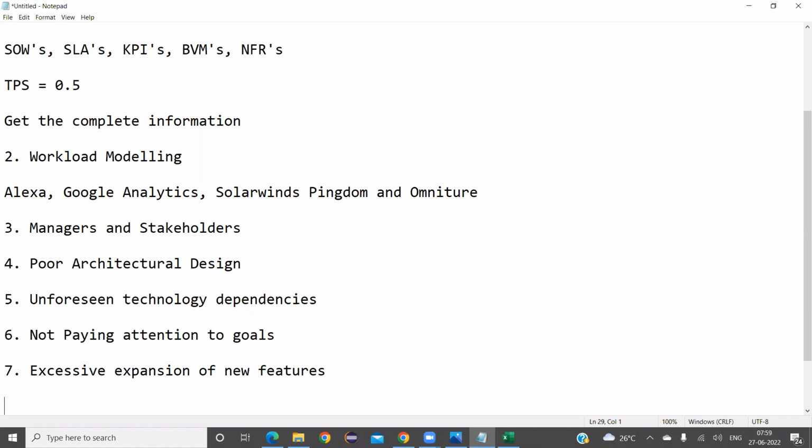Performance engineers have to start by planning the test environments. They should know the release schedules, and each one of you has to proactively communicate how much time it is going to take to test the application from the performance front if any new features are added at the last minute of a release. Many projects have fixed timelines and deadlines. For that reason, you have to plan your environment requirements ahead of your schedule. If you are not planning ahead of the project schedule, it is going to give you unexpected development delays and environment delays that will affect your performance testing timeline again.